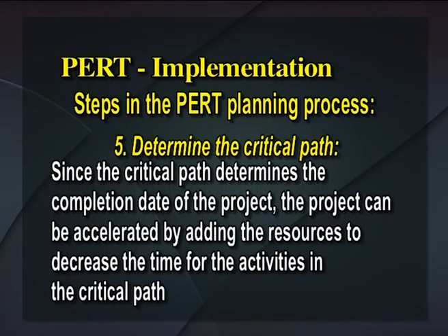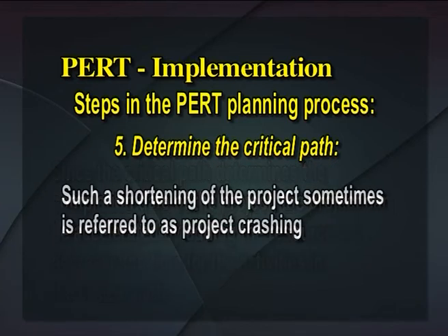Since the critical path determines the completion date of the project, the project can be accelerated by adding resources to decrease the time for the activities in the critical path. Such a shortening of the project sometimes is referred to as project crashing.